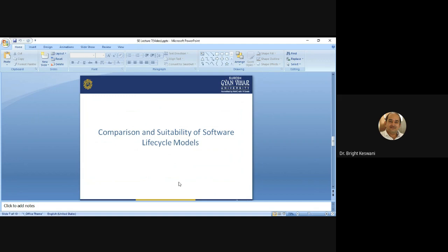When we are talking about the evolutionary life cycle model, it applies the sequential aspects of the waterfall model and the partitioning of the project borrowed from the incremental model, but adds the evolution or the discovery of requirements. So the evolutionary life cycle model is the preferable model when requirements are not fully known, but a subset of the requirements is known, stable, and understood.